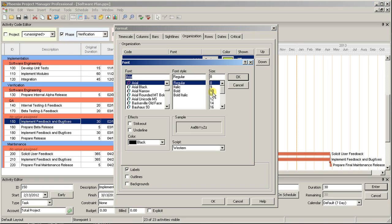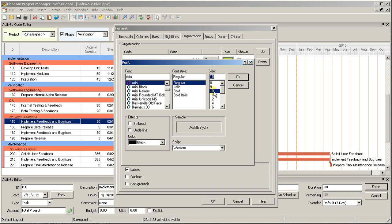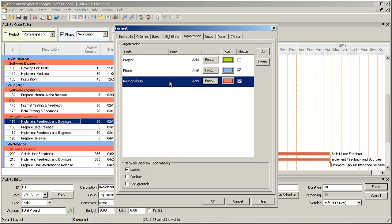You can also change the order in which codes are applied to the schedule organization. That means if you'd rather have your schedule broken up by Responsibility first, then Phase, it's as easy as changing their order in this window.